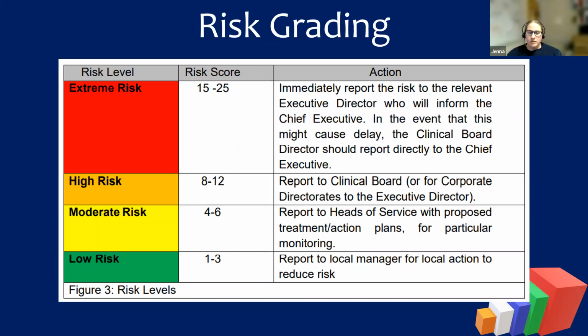If you're thinking about risks that come out as a high risk, whilst it's not an extreme risk, which means it probably doesn't happen every day, it's still really concerning and it does need to be escalated. Your moderate risks are more likely to be things that can be sorted within your directorate or within your clinical board, where you might need to mention to your service managers, and we can get something in place to sort that. And then obviously you've got your low risks, which doesn't mean that it is not important. It just means that it's likely that it can be managed within local policies.